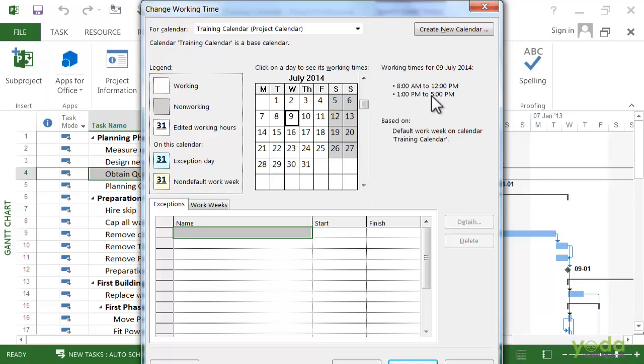Well, the first thing to do is to go to the Work Weeks tab. Work weeks are basically the schedules that people follow week after week. Now you can see here there is a default work week. The start and the finish is set to NA. That means it applies to all the dates. When I click Details, the details for the default show up so I know which work week I am working on. In this case, we are going to set Friday to a non-working day.